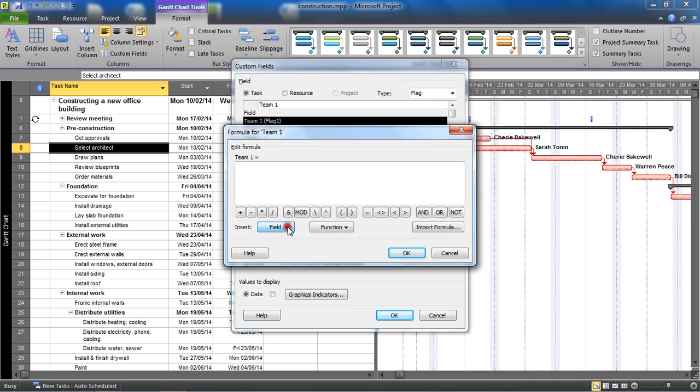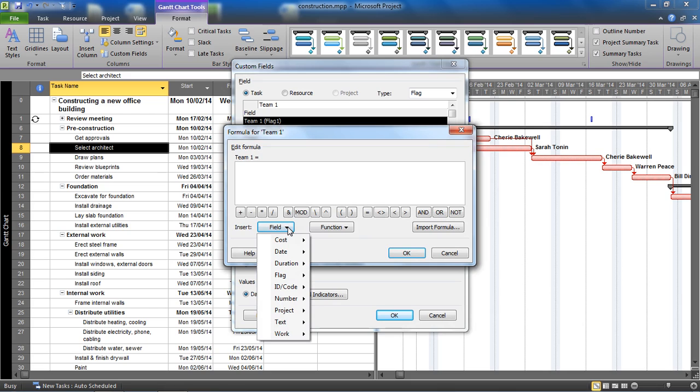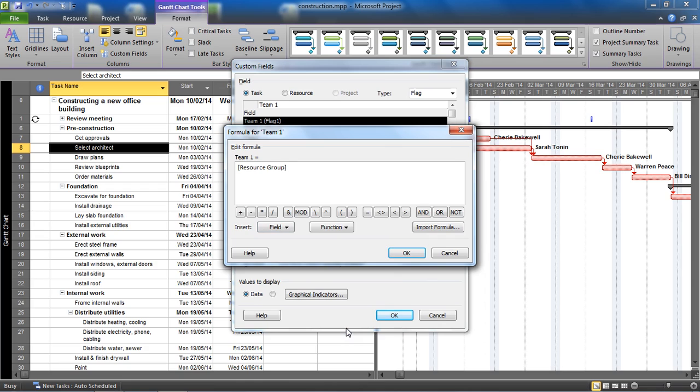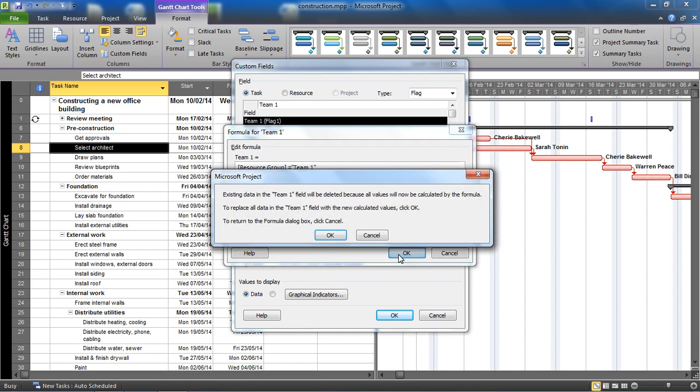In this formula I need to get the resource group field because that's what is storing this information. That I believe is a text field and resource group - see there's loads of fields in here - resource group. You could just type that if you're happy with the anatomy of how to type a field. Equals and then in speech marks, double inverted commas, I'm going to write team one, just a piece of text. I need to enclose it in speech marks. Does the contents of resource group equal team one?